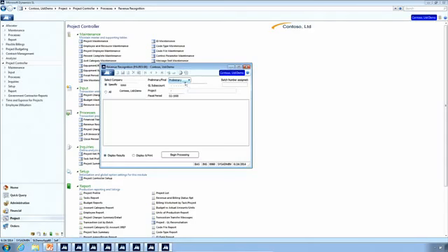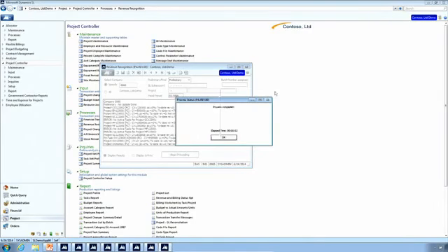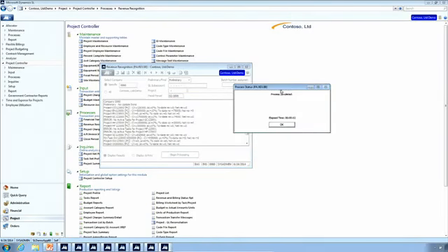So revenue recognition allows us to recognize how far along the project is based on the contract value. I'm running this in preliminary mode, and this will let us see the results. So you can see all the projects that are set up as percent complete. Basically, the process will go through and review the contract value. It'll identify what the percent complete is, and then it will determine what the year-to-date revenue is compared to what it's recognized before. If it finds that it has not recognized enough previously, it will generate a transaction to recognize more revenue.